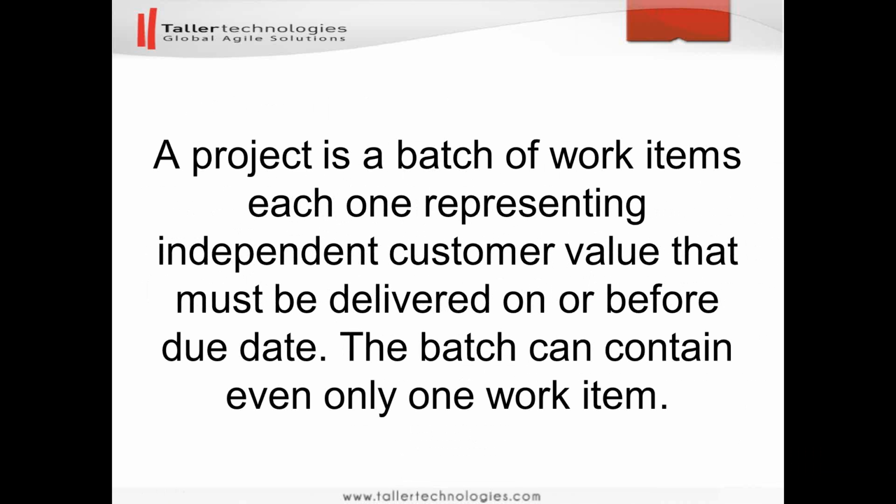A project is a batch of work items, each one representing independent customer value that must be delivered on or before a due date. The batch can contain even only one work item. The size of the work item doesn't matter. There are only two sizes, small enough and too big. Too big should be naturally split by a mature development organization or a team and not allowed to enter the backlog of the project.